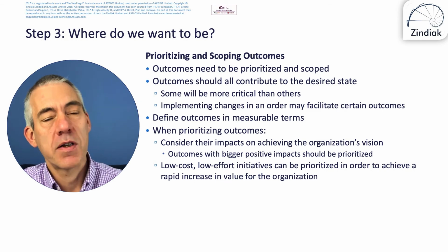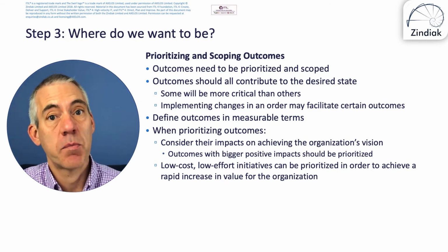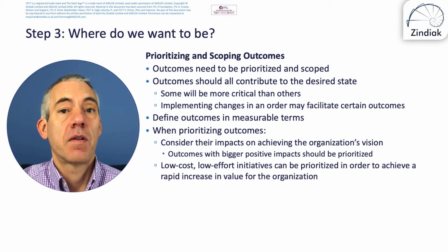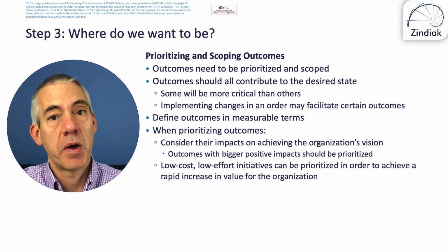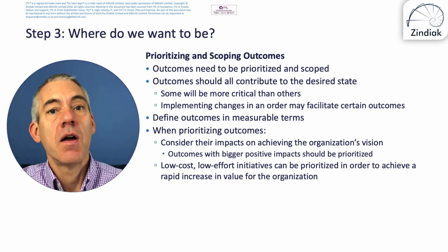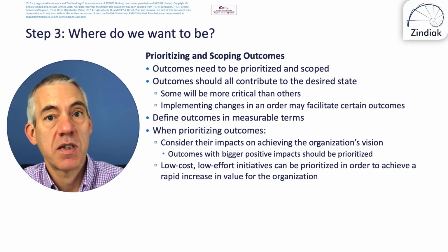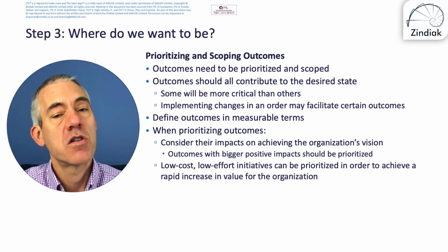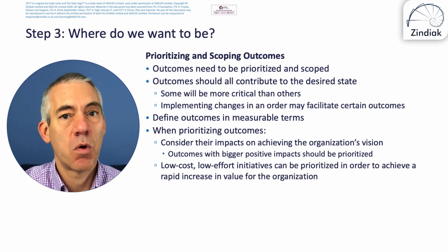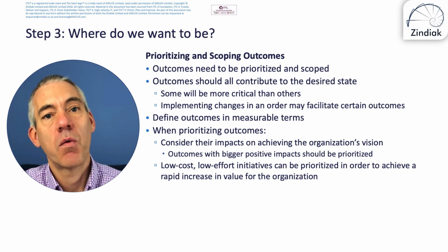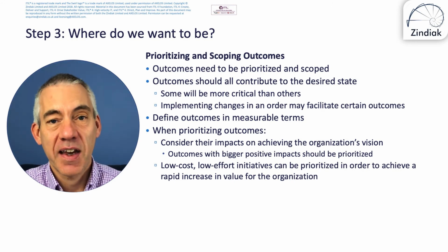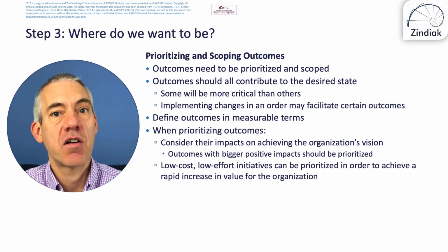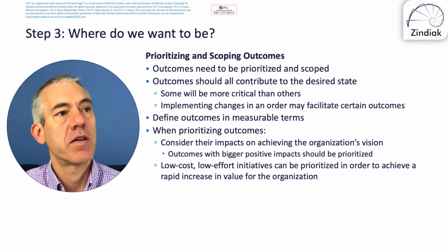So prioritizing and scoping outcomes is really important, that we understand the relative priorities, both in the long or medium term across the whole improvement initiative, which could be several months, like I said, it could be a year, as opposed to just this step. What are the priorities in just this step? So you can use MoSCoW on both. Some organisations like to use MoSCoW on one and just an ordered list on another, whatever works for you. I really like MoSCoW, so I tend to use MoSCoW on both. But it's just so we all have a clear shared understanding of what those priorities are.